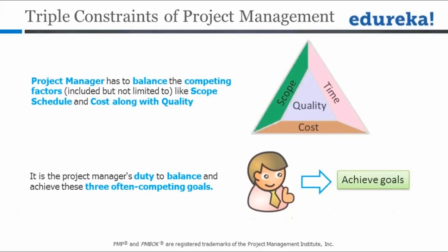There will be a scope which is defined. When we start doing the things, we might find that there is more things coming up. We need to change through a proper change management procedure. There is a schedule. If there is an increase in the scope, it will impact either or both, I mean in both, like time and cost both. Now we have to balance those through proper change management practices, or see if that scope is actually required or not.